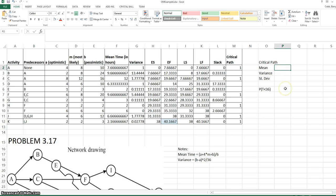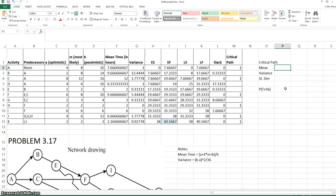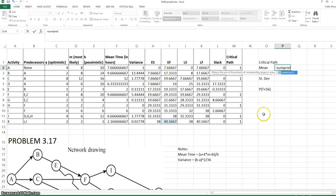I have a set of cells up here where we'll calculate the mean for the critical path, the variance for the critical path, and the standard deviation. To find the mean of the critical path, we would simply sum up the mean time for each of the critical activities. This should also be equal to the project completion time of 40.17, but we'll make a calculation to make sure we've done our work correctly.